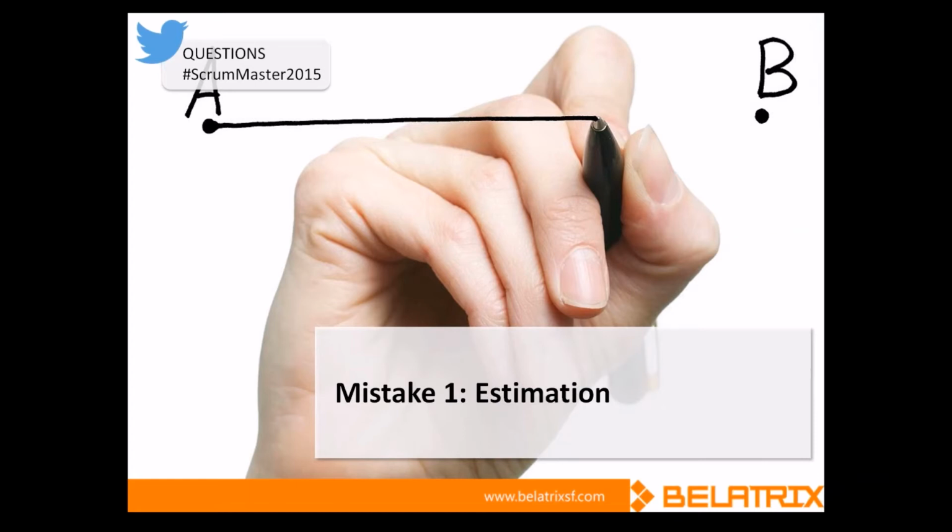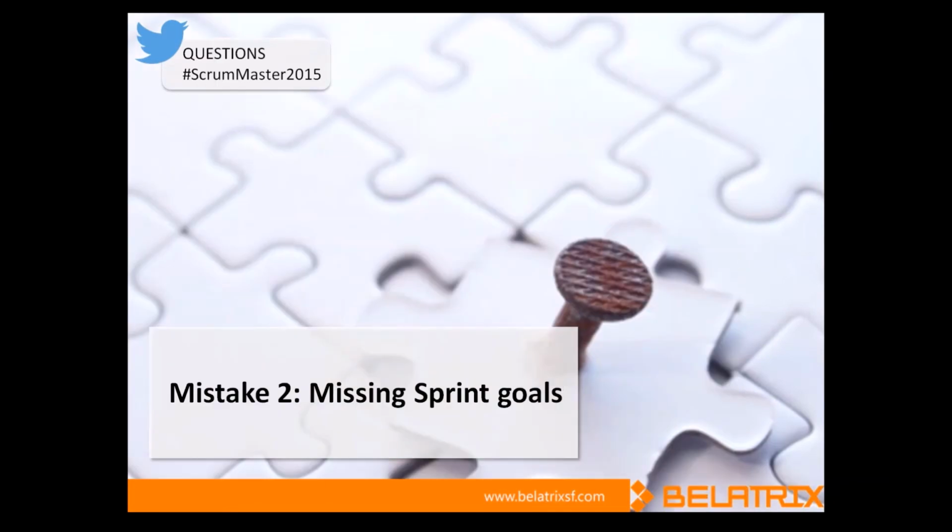We've spoken here about estimation and some of the challenges with estimation. What about some of the other mistakes that you see? Okay, another mistake that I typically see and have noticed is that sometimes we spend the whole day in planning. They tend to be 3 to 4 hours of planning, estimating tasks and stories, and we fail to define the sprint goal, or to ask ourselves why those stories are being included in the sprint and why they are important. So it's really important to have visibility of the roadmap, maybe the project roadmap, and better if you could see the sprint roadmap.